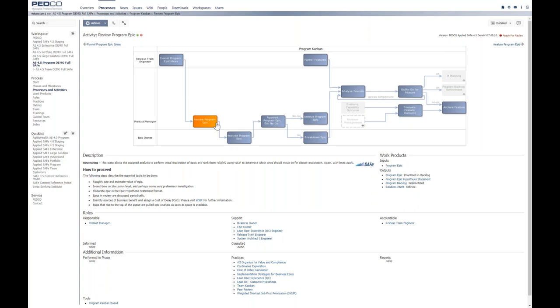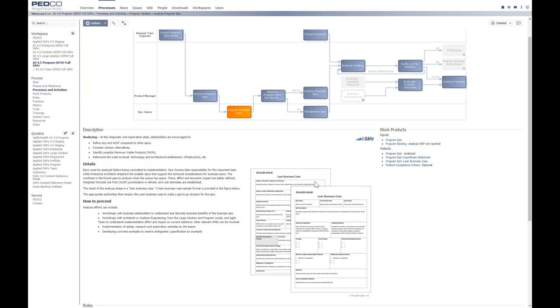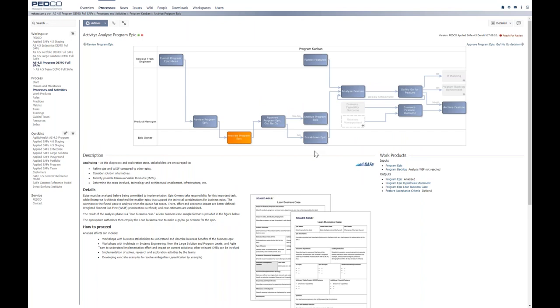For example, it gets defined and you create the so-called lean business case. Then you prepare the backlogs, and as soon as a solution train or a release train is ready to take the next epics or features, then they start to implement it or deliver it or eventually release it to their clients. And remember, releasing is done on demand and not within the cadence of the PI. So to close now the cycle on this Kanban here, we come back at the end and we have delivered and evaluate feature outcome. So that's the end of the complete